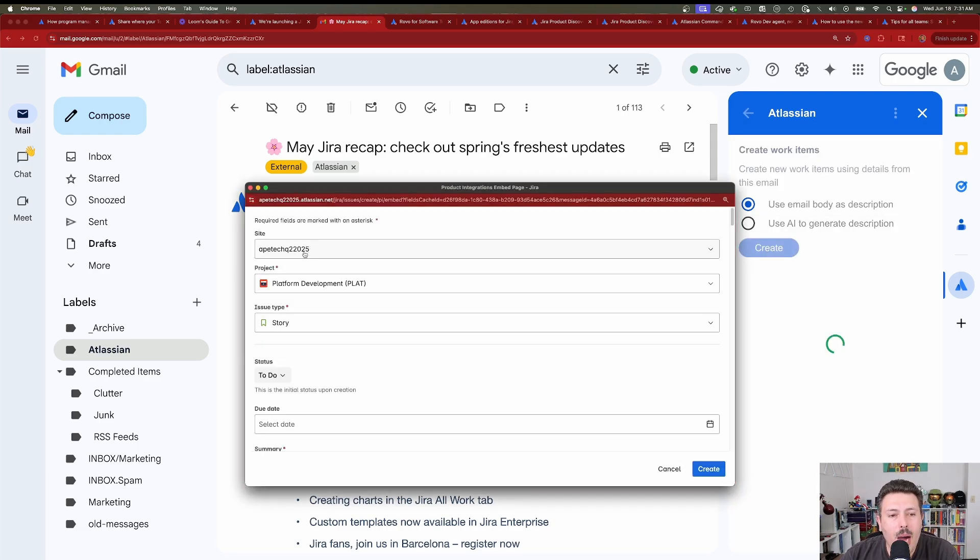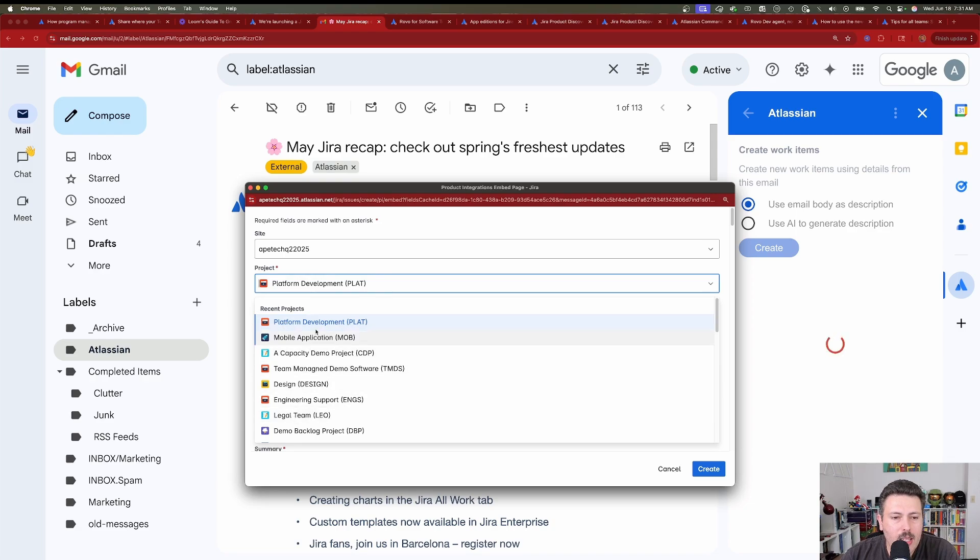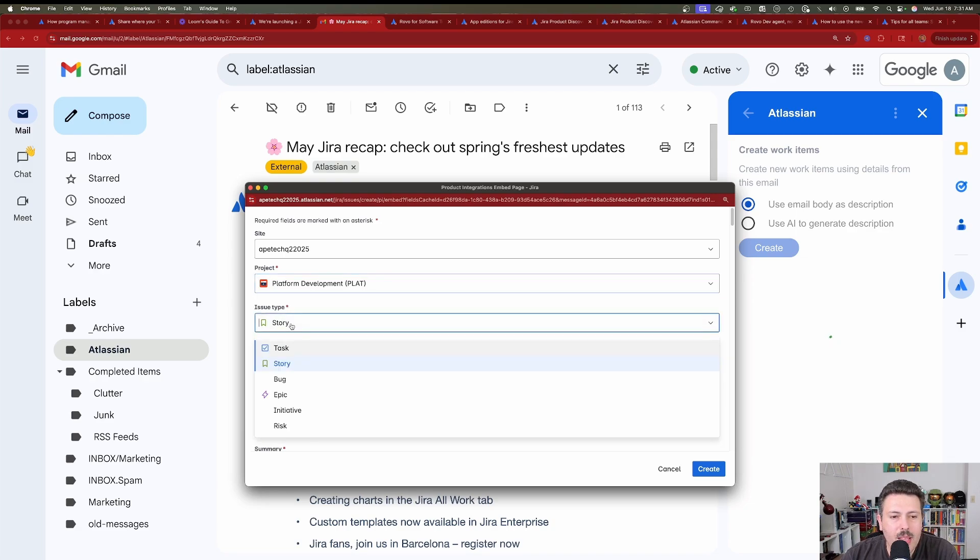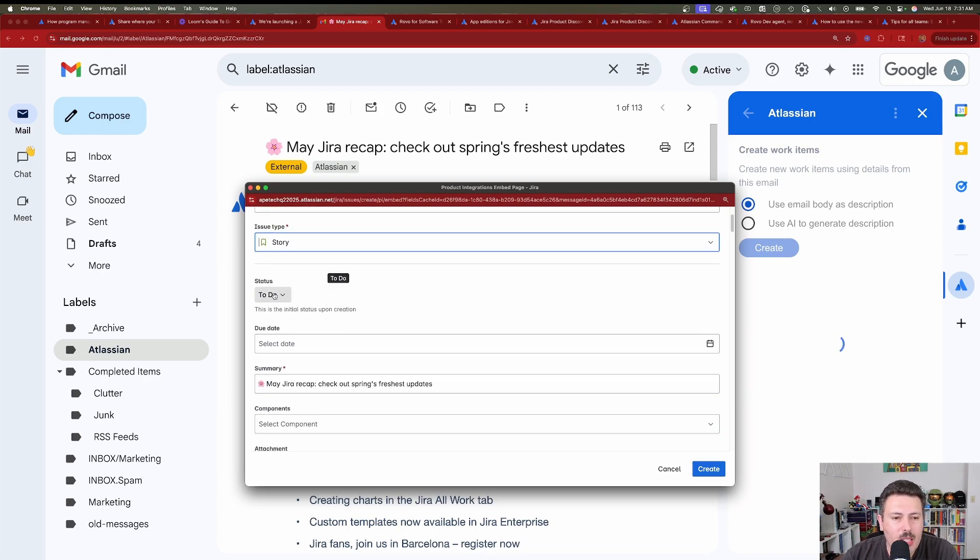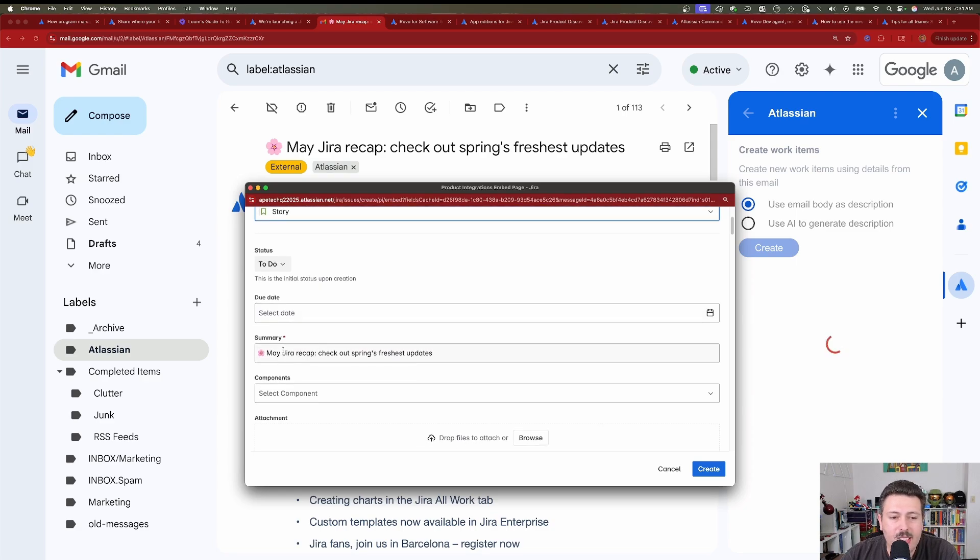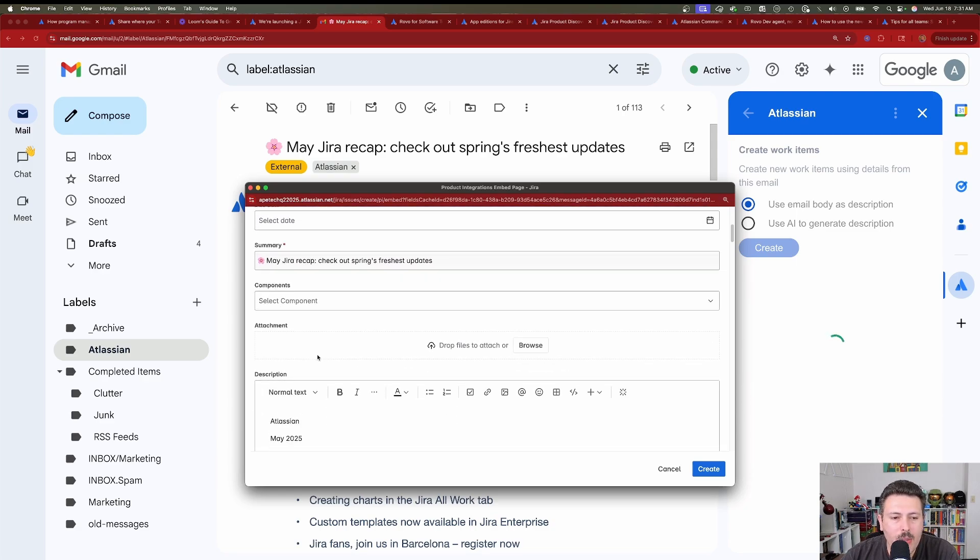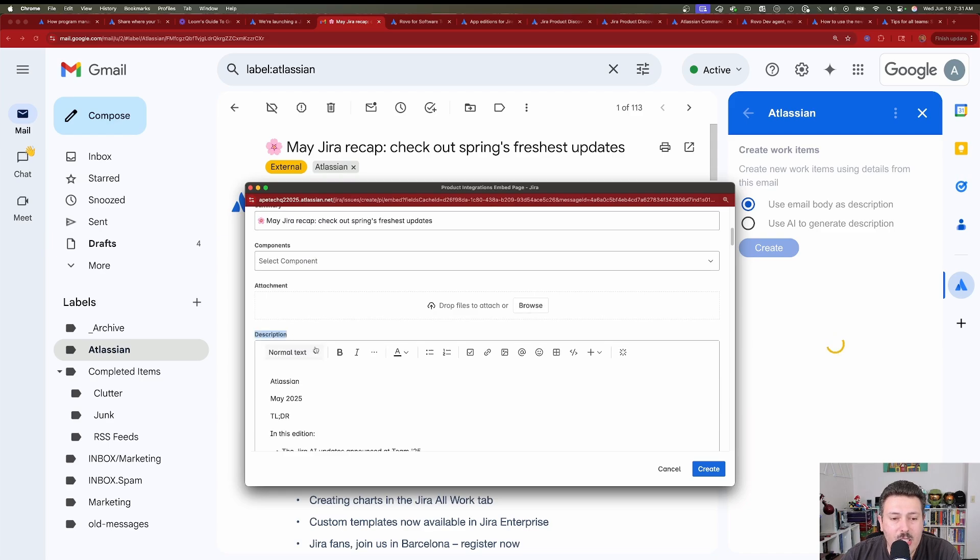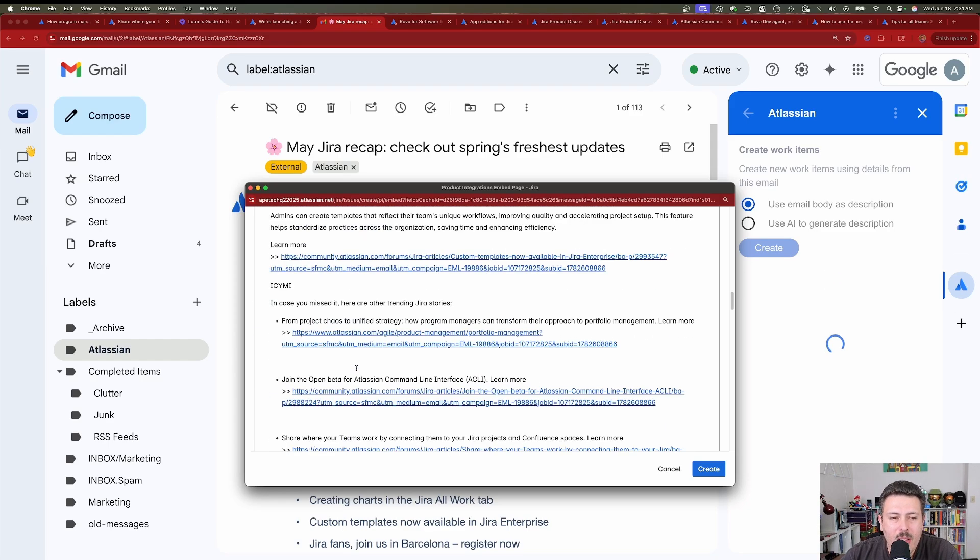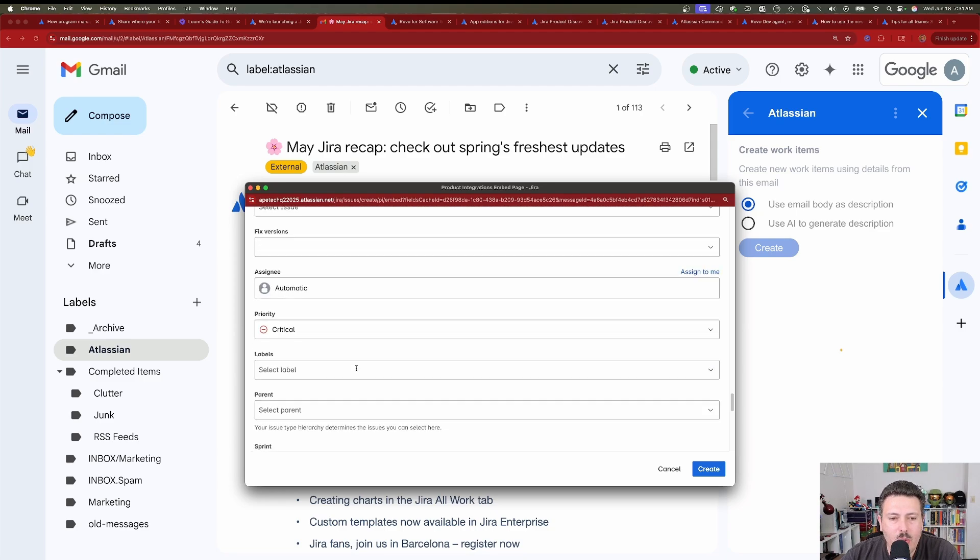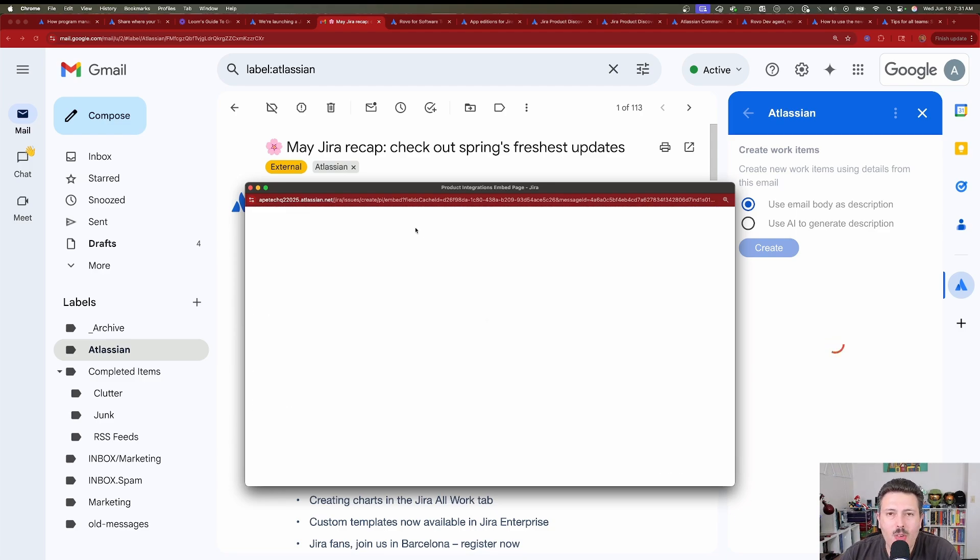So we get a pop-up that has the site already predetermined because we connected that. We now get to pick our Jira project that we want to put this in. So let's go with the platform one is okay. Then you get to pick whether you want to make it a story, task, or a bug or any of the other work item types that are inside of your Jira project. You can change the status, set the due date. The summary is already preset for you. You can fill out the rest of the fields however you want, but another one that's interesting is the description. It just takes the plain text of that email with the URLs and everything else, puts it in there for you, and again, fill out the rest of the fields.